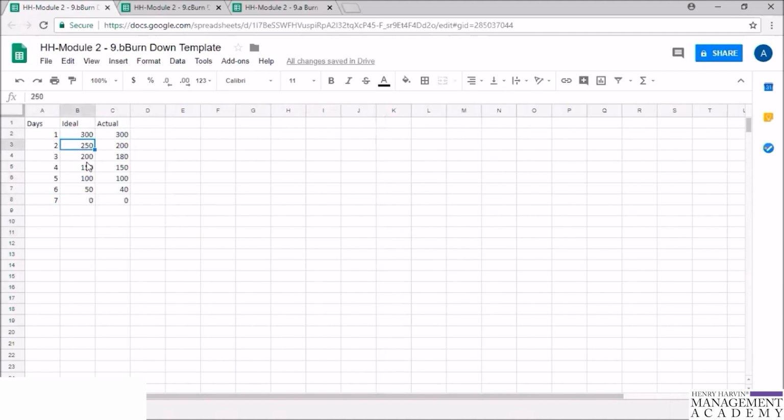So the ideal trend is 300 and 250. How do we come to 300? Say suppose 5 developers are working in a sprint, and they are considering IEH, that is ideal engineering hours, as 6, and total days in a sprint is 10. Which means a team is having equal to this into IEH into this, which means 300 hours.